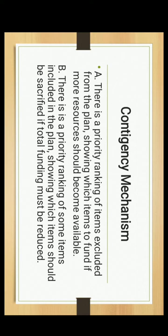The Contingency Mechanism includes two components. First, there is a priority ranking of items excluded from the plan, showing which items to fund if more resources should become available. Second, there is a priority ranking of some items included in the plan, showing which items should be sacrificed if total funding must be reduced.